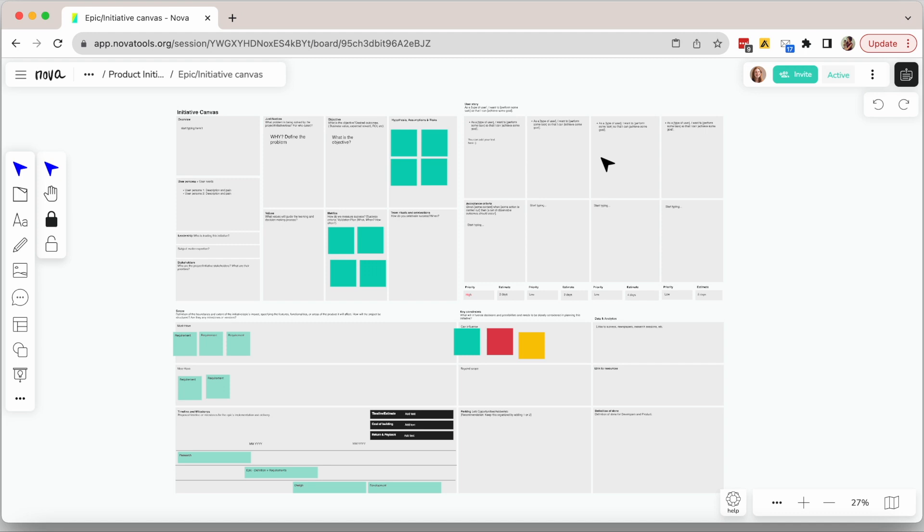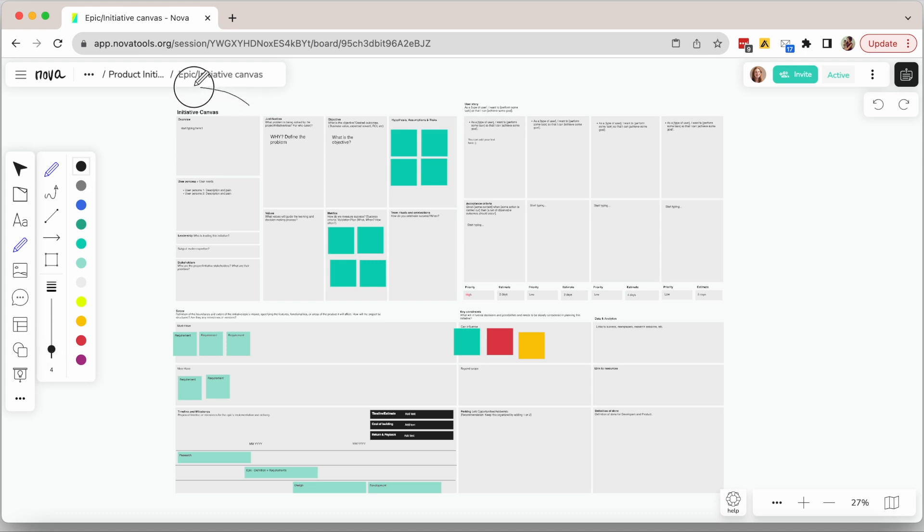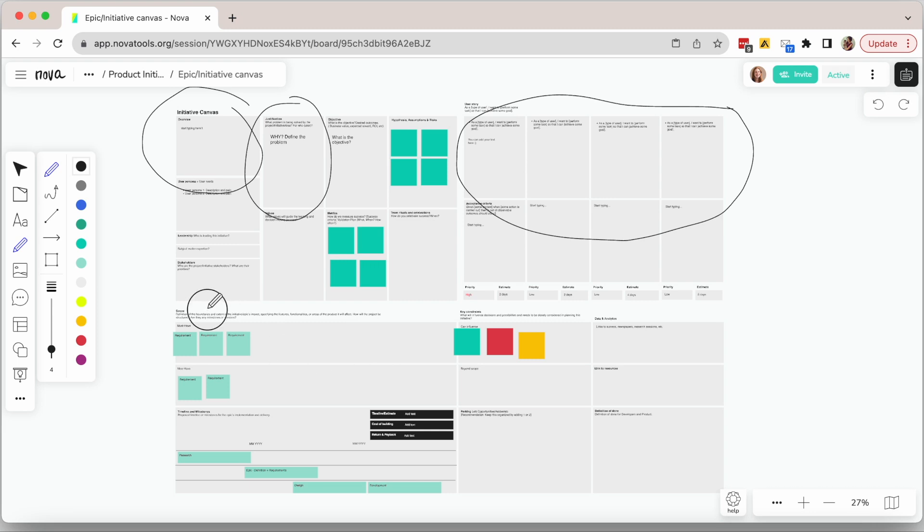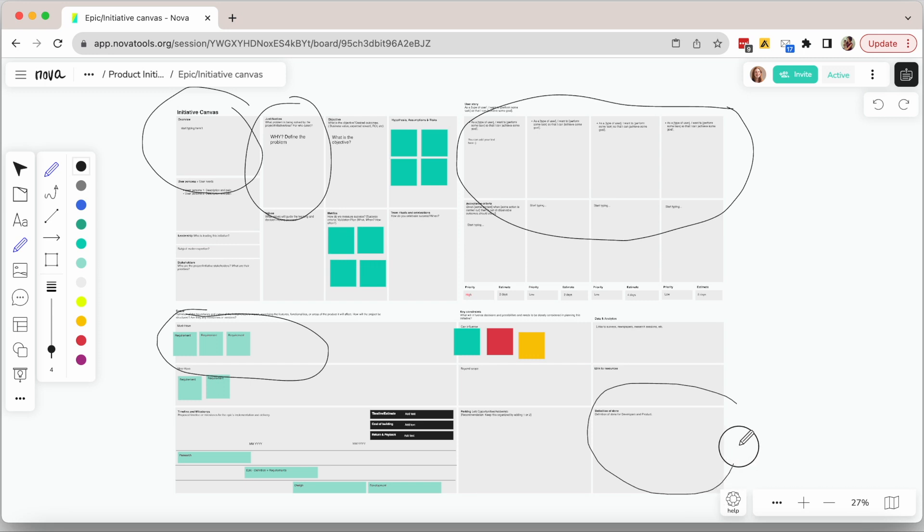Of course, once all the information about the epic is defined and discussed with the team, then you can add this to JIRA for the design team or the development team. If you have questions about what should be different about your tickets in JIRA and your board, the answer is not equal for all, as it depends on your team. But often in JIRA, you will define the problem you're trying to solve. You will add all the user stories, define the requirements, and sometimes even include a must-have, nice-to-have, and out-of-scope, and the definition of done. Then you can add a link to the design, the user personas, and the initiative or epic board for more information.